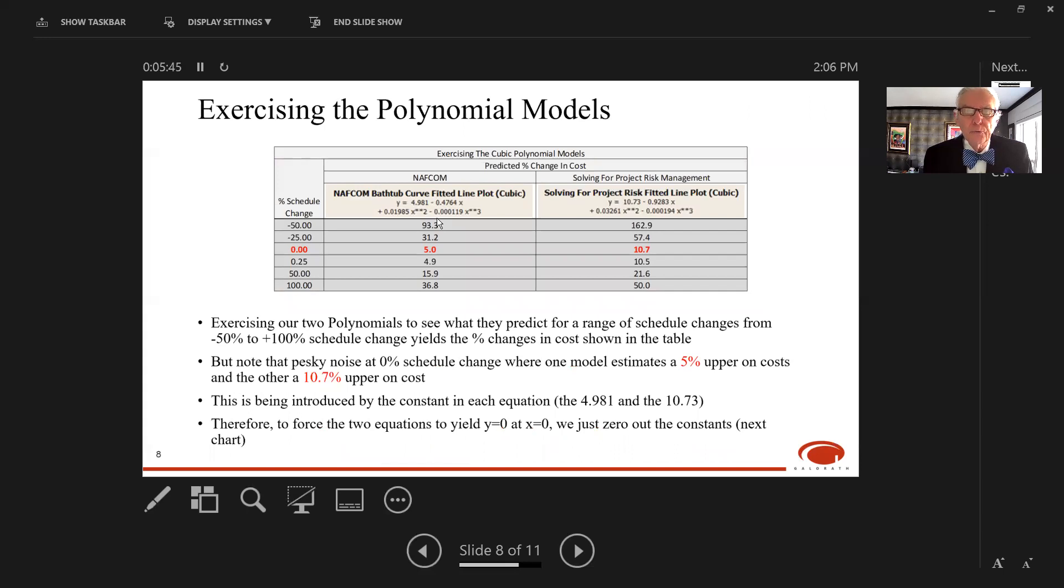Let's exercise the polynomials and see what we get. I've exercised the polynomial from NAFCOM on the left and the one from the project risk management book on the right. For minus 50 percent schedule compression, we're getting 93 percent from the NAFCOM equation, close to the 88 percent we saw before. The equation from the project risk book predicts 163 percent schedule cost impact for 50 percent schedule compression.